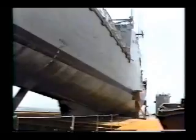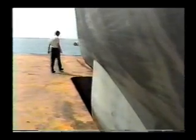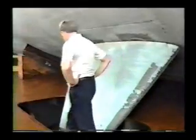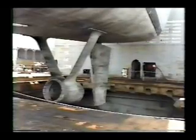I heard you made some special preparations on board on deck the Mighty Servant. Is that correct? That's correct. Although every transport is different, this transport has some special things we had to prepare. We had to cut some quite big holes in our deck to accommodate the sonar dome and the stabilizer fins. And further aft to the Samuel B. Roberts, we also had to accommodate the propeller shaft and the rudder.